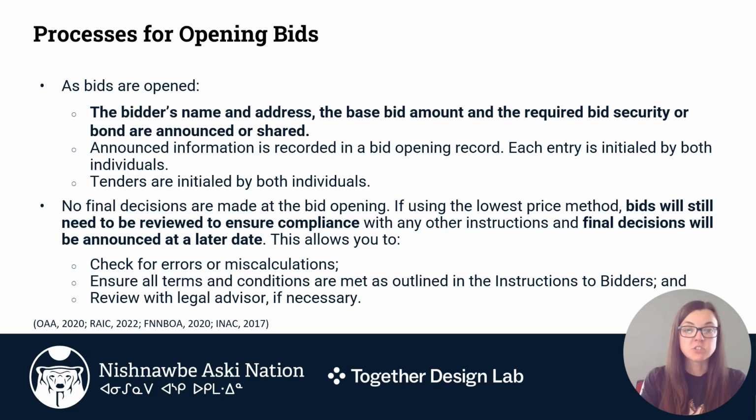No final decisions are made at the bid opening. If using the lowest price method, bids will still need to be reviewed to ensure compliance with any other instructions, and final decisions will be announced at a later date.